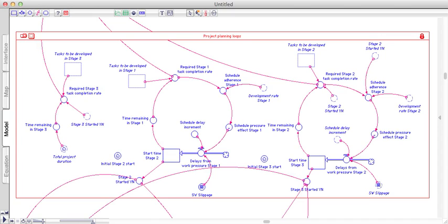The flow, or better phrased, the loops in project planning. What happens in this project is that there are some initial timings for the stage gates, but these timings get postponed. There is some schedule slippage. And that's true for the timing of stage 2 and true for the timing of stage 3. This happened in the case, and the two loops here explain why that occurred.